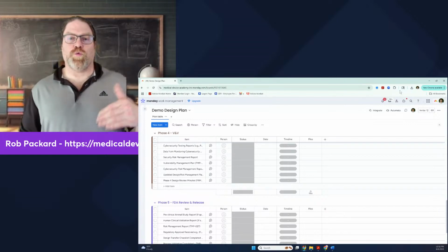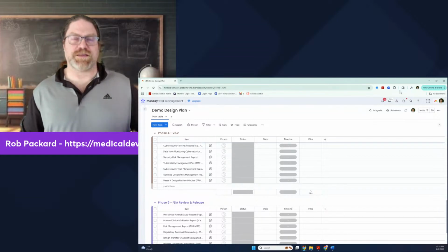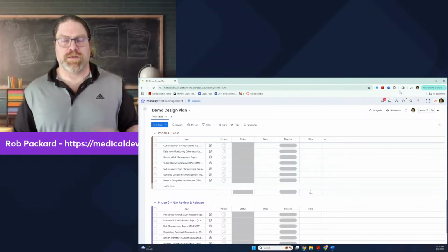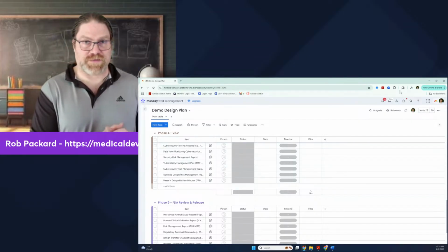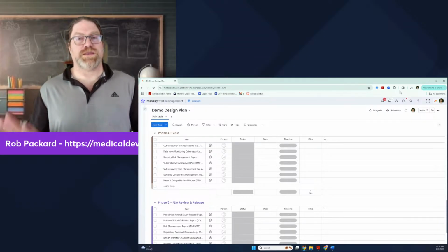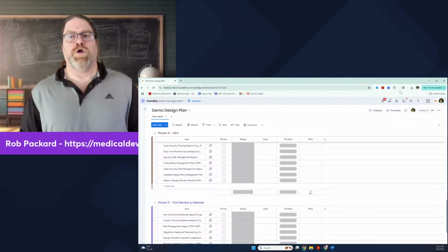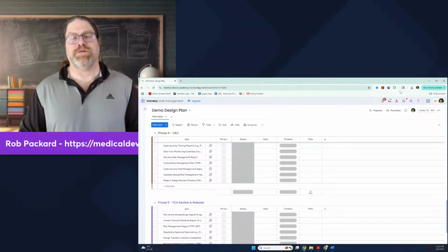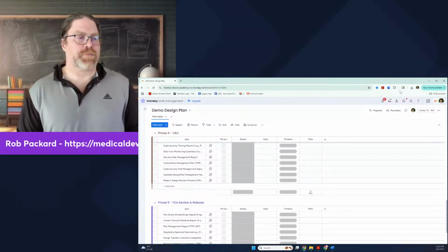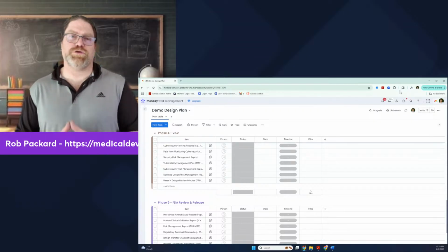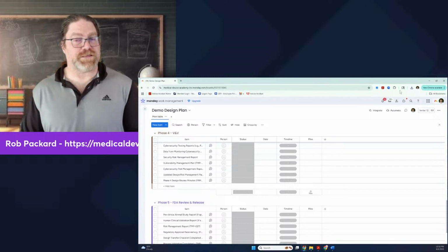If you want to work on your animal testing earlier, you move it up earlier in your schedule into phase 4, into the V&V stage, where most people would put it. If you say we don't need to do animal testing right now, we just need clearance, and we can do that with benchtop testing, then we'll do animal testing later and push that out. Same thing with human clinical testing. Maybe you're only doing the human clinical testing in order to support reimbursement. That's a very common practice.